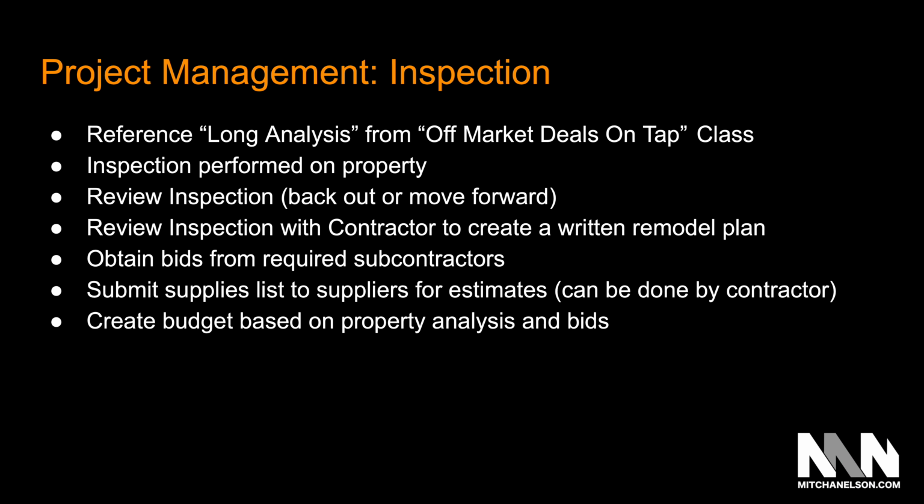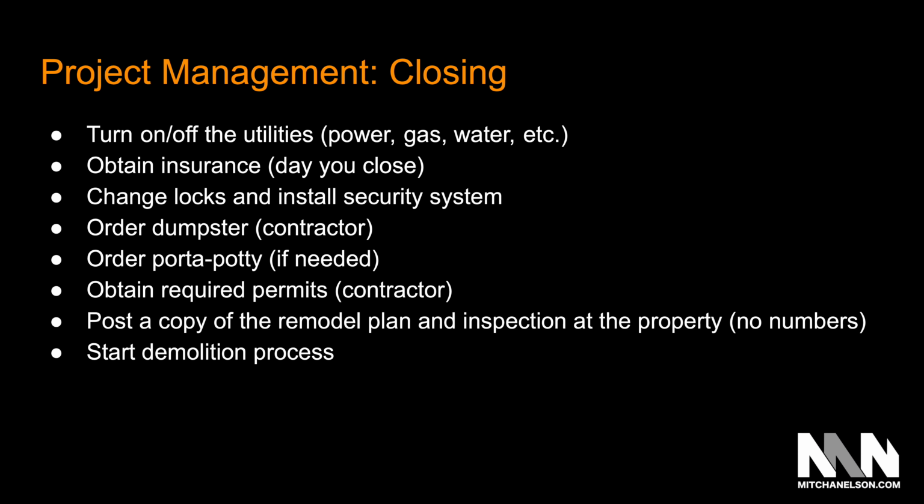So create a budget based on the property analysis and bids. Turn on and off the utilities. Make sure that the day you buy the property, you call the power, gas, water companies, etc., and put the utilities in your name. And the day you sell the property, do the same thing and turn them off, right? So that the new buyer can come in and put them in their name.